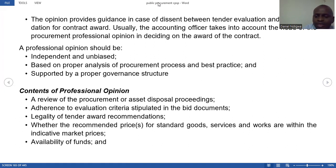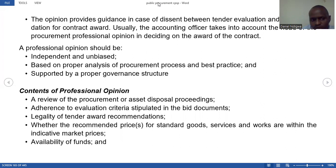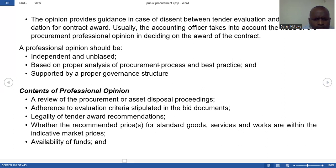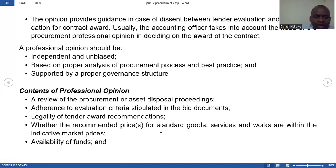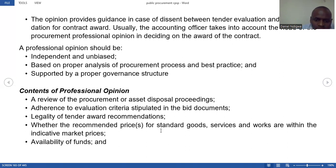A professional opinion should be independent and unbiased, not biased when writing. It should be based on proper analysis of the procurement process and best practice. The contents of the professional opinion include: a review of procurement or asset disposal proceedings, adherence to the evaluation criteria stipulated in the bid document, the legality of the recommended tender award, and recommendations on various critical issues.